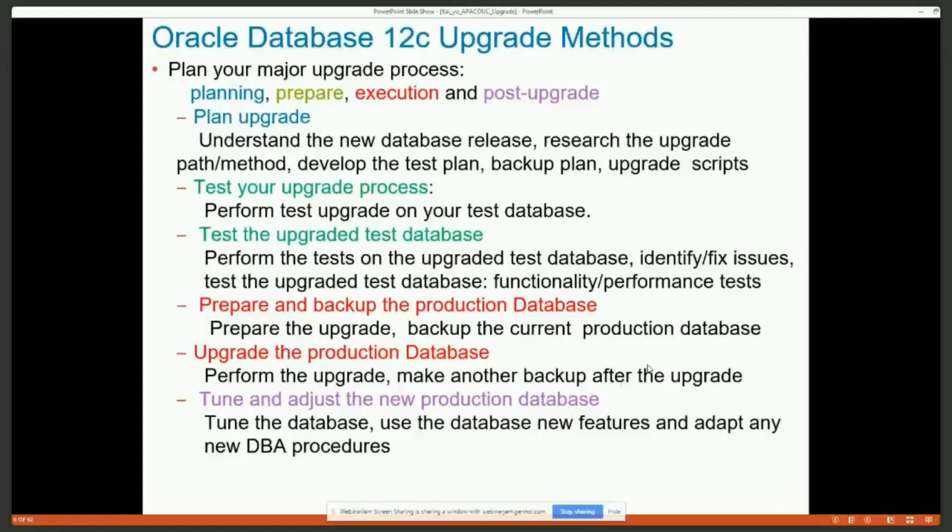Then, so have confidence. You already tested the plan. You probably want to test a couple of times. Then you move to the production upgrade. Of course, you start by preparing all the necessary steps and backing up your production database, so in case something happens and the upgrade doesn't go through, you have a way to restore your database. Then, of course, the important step is really upgrading your database.